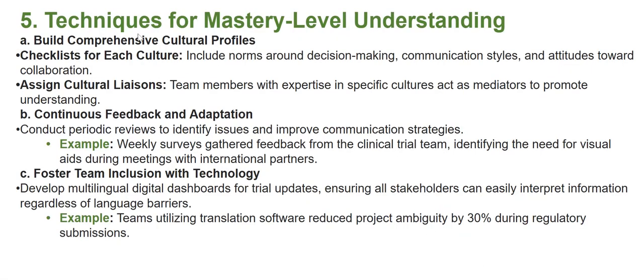Techniques for mastery level understanding. Build comprehensive cultural profiles. Checklists for each culture include norms around decision making, communication styles, and attitudes toward collaboration. Assign cultural liaisons. Team members with expertise in specific cultures act as mediators to promote understanding. Continuous feedback and adaptation. Conduct periodic reviews to identify issues and improve communication strategies.